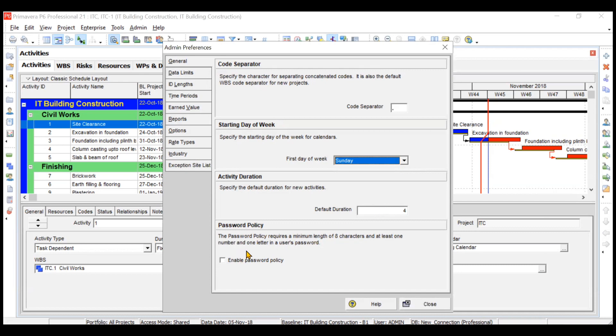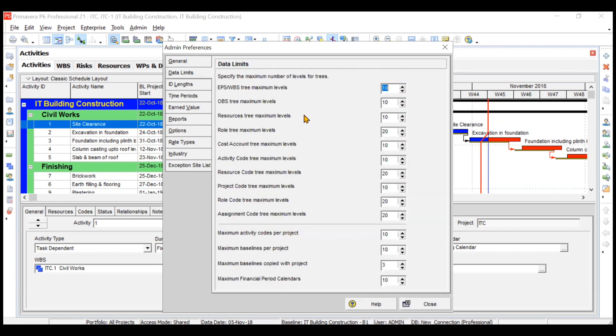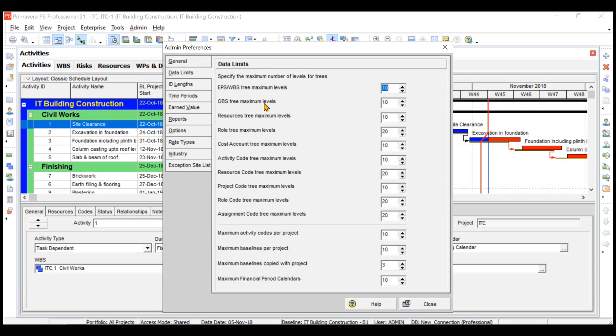Then some data limits. When you create EPS, WBS, OBS, resources, and roles, you have some limits. For EPS you can only have 10 levels, like one below the other. Similarly for OBS also, you can have maximum 10 levels as per the default.